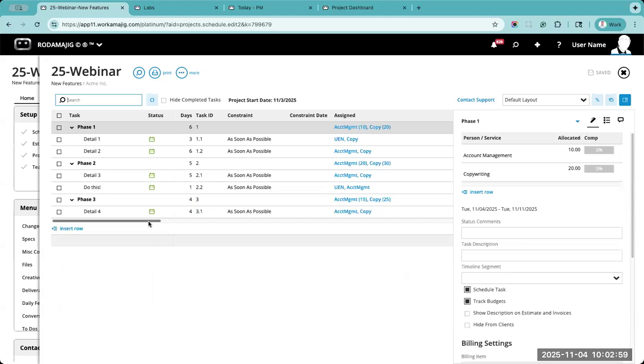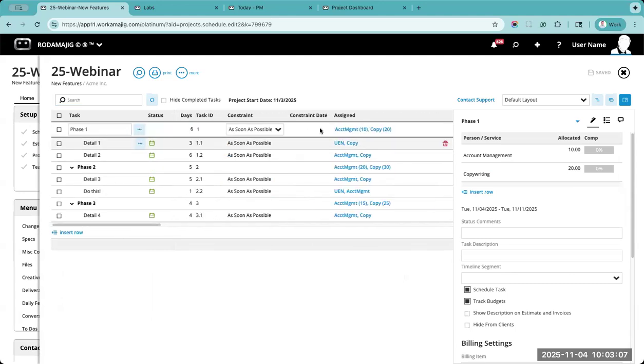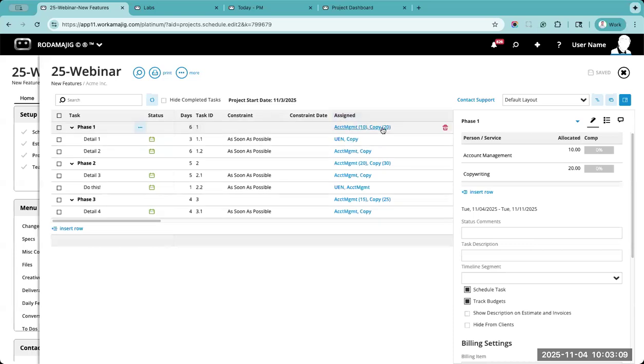The major change is that we allow you to allocate and budget at, or I mean, we always let you budget at this level, but we didn't used to let you assign at this level. So typically, the vision here is that on the summary level is where you'll put your services and you'll allocate time. Think of it as the bucket, if you will. You're not necessarily going to put people here. Now, you could if you really wanted to, but then your users would see two tasks appear in their Today Creative versus just the one that you're assigning them to below.